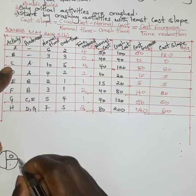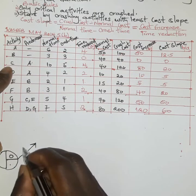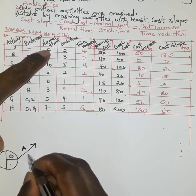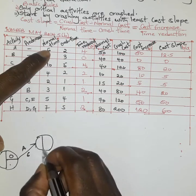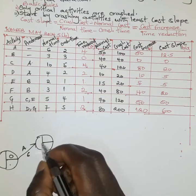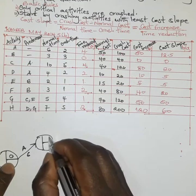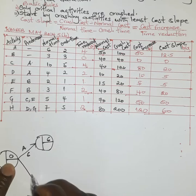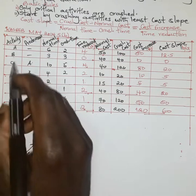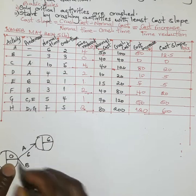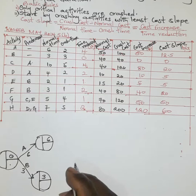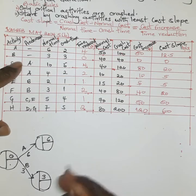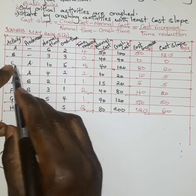Activities A and B both begin from the zero node. Activity A has a duration of six weeks, so it ends at node 0 + 6 = 6. Activity B takes a duration of three weeks, ending at 0 + 3 = 3.